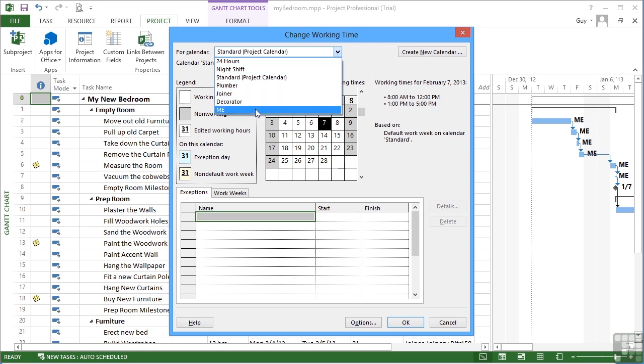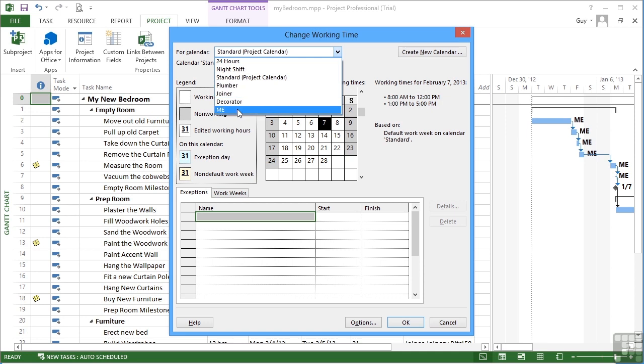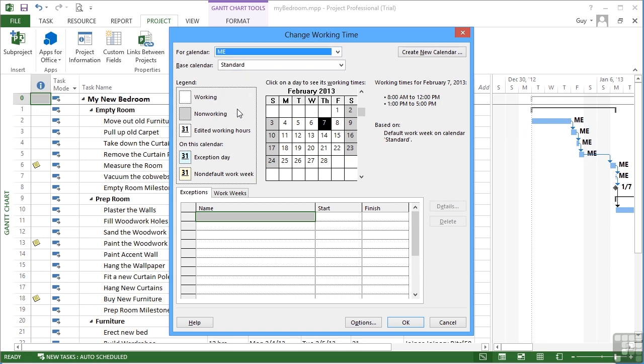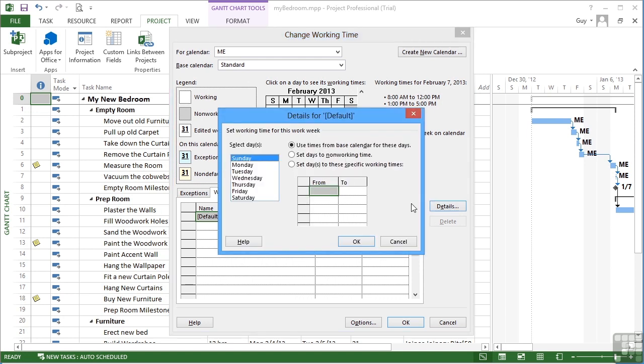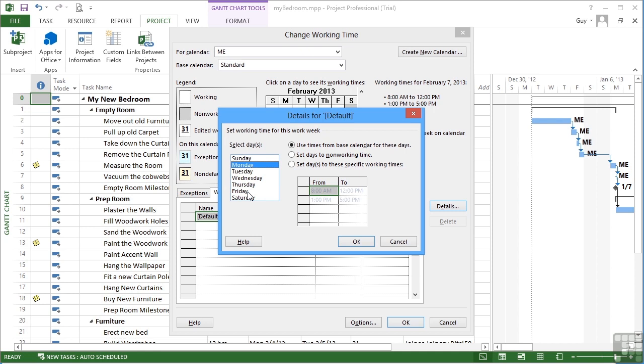So the decorator, me even, the joiner and the plumber. If I were to access me and go to work weeks, I want to change my default work week. Mondays 8 till 12, 1 till 5. Now on each of these weekdays, I can actually work until 6. So I need to set the days to a specific working time. I'm going to change Monday to Friday. Let's select Monday to Friday by using shift-click down this list.